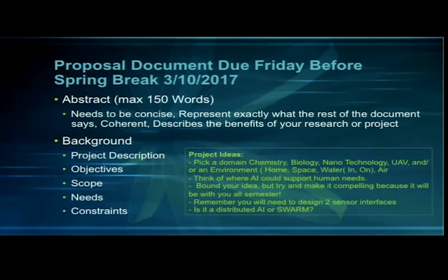Go to the end and work your way backwards. If you know that at the end of the semester on this day you have to do a presentation, there's a whole bunch of stuff that has to be done, and it's a really good idea to work backwards from that. I'm just telling you from experience. Work backwards to get to a really good schedule where you can say, this is what we have to do.